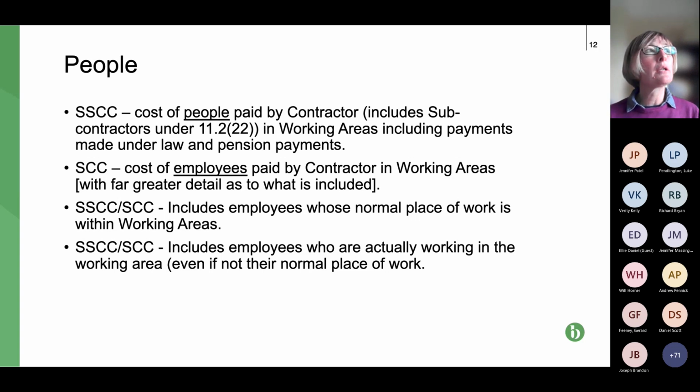So the great long list, fundamentally it includes the cost of employees, so what they're paid. It obviously includes the tax that is paid, PAYE, on their behalf. So that's income tax, national insurance, but it also includes those extras: cost of health insurance, cost of company car, cost of their accommodation if they're working away.